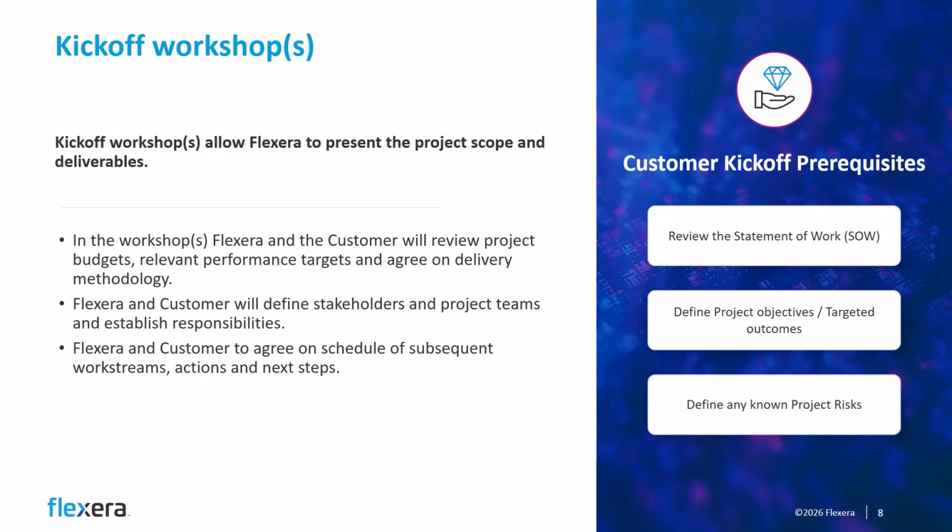The statement of work is reviewed. Customers' project objectives and targeted outcomes are discussed, and any known project risks, especially around data availability, access, and resourcing, are discussed. It is also important to consider project team locations, time zones, and escalation methods.